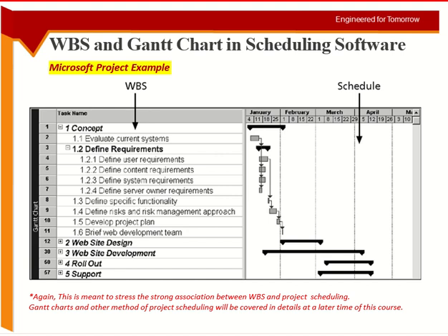Now you see task 1 is going into 4 weeks of January and the first week of February, so basically 5 weeks. All the activities within this task must be completed within these 5 weeks.